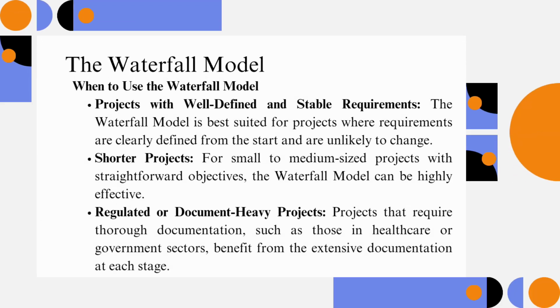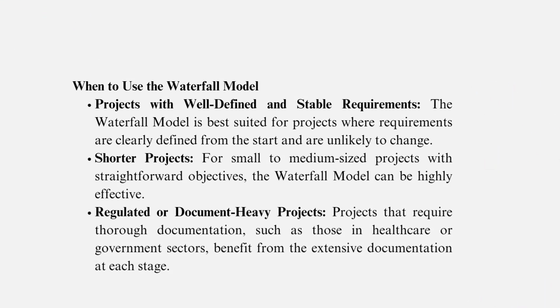When to use the waterfall model. Projects with well-defined and stable requirements. The waterfall model is best suited for projects where requirements are clearly defined from the start and are unlikely to change. Shorter projects. For small to medium-sized projects with straightforward objectives, the waterfall model can be highly effective. Regulated or document-heavy projects. Projects that require thorough documentation, such as those in healthcare or government sectors, benefit from the extensive documentation at each stage.